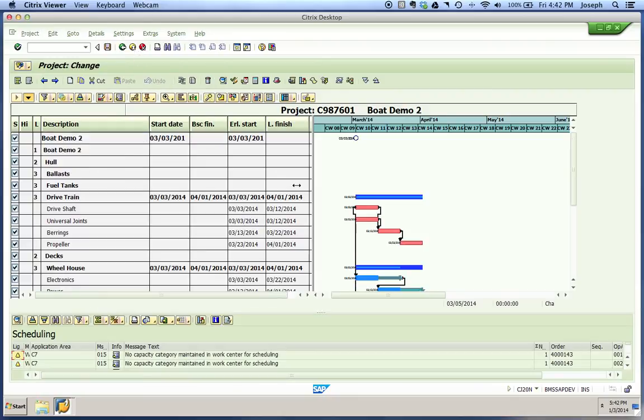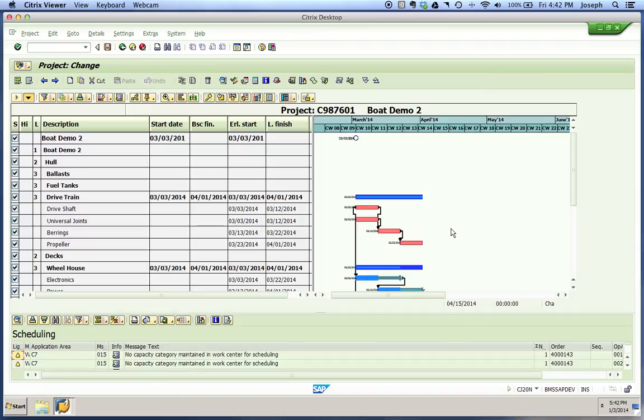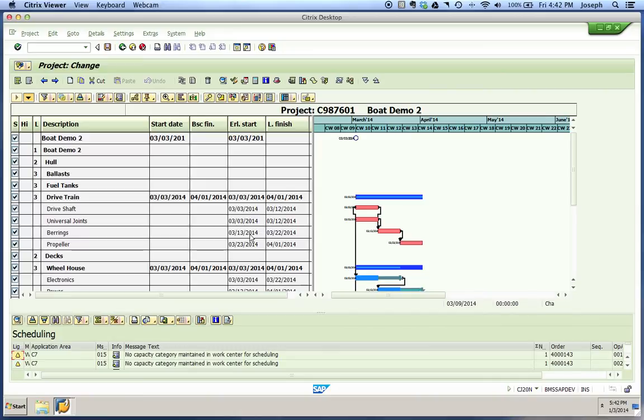You'll notice in real time that this just changed. Our whole graphic just changed and it's going to show all the different lengths and times. Here's our first two activities that begin at the same time. They have finish-start relationships with this third activity, our bearings, which begins second. Then our final one, our propeller, begins third.